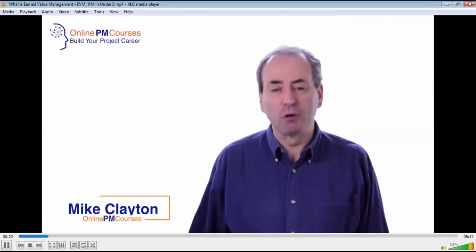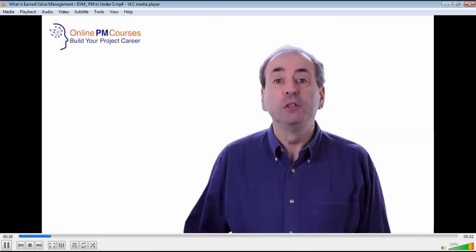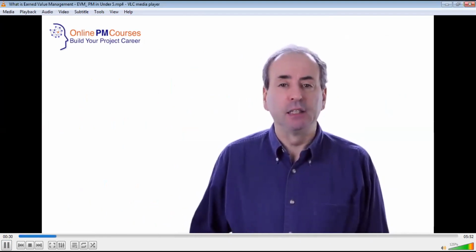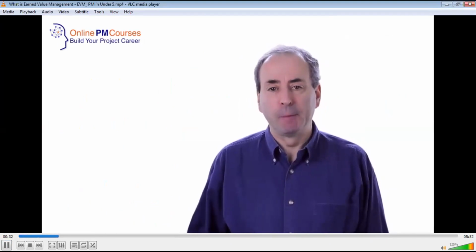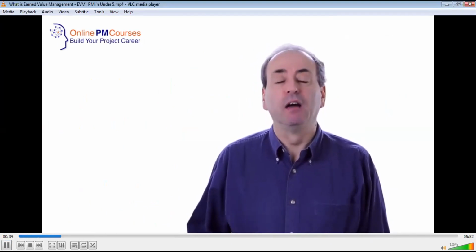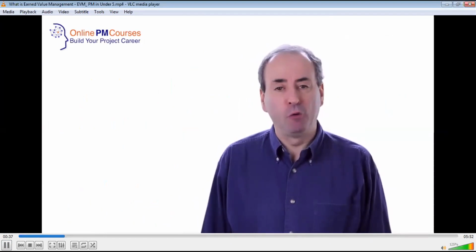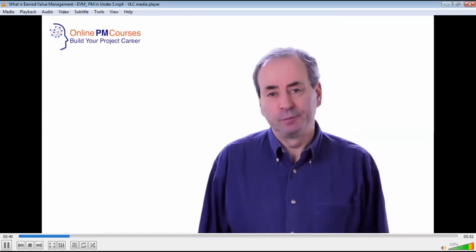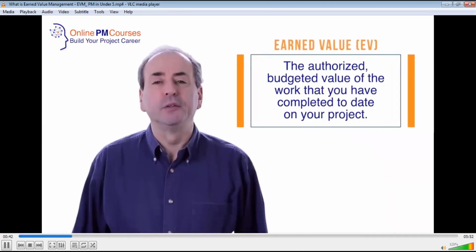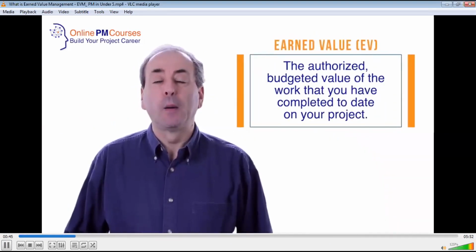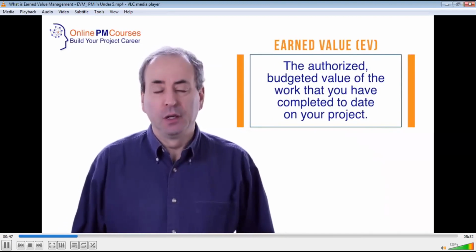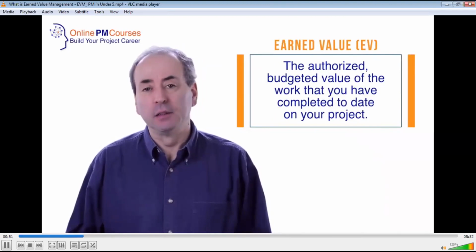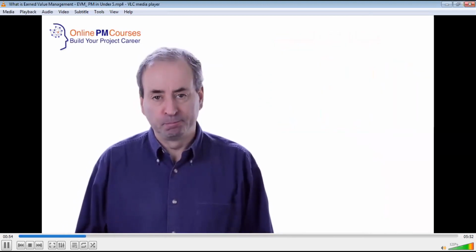Performance of its programs. And to this day, all government programs in the United States use earned value management as their means of measuring and managing performance. So, what is earned value? Earned value is the authorized budgeted value of the work that you have successfully completed to date on your project.